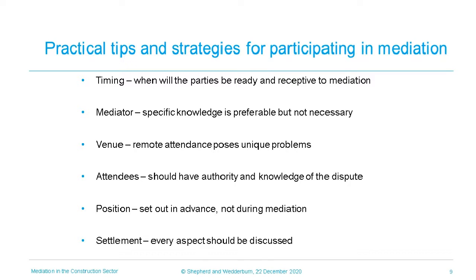Opportunity here is calculated differently than for other, less flexible methods of dispute resolution. It is best calculated by pragmatically assessing when each party will be ready and receptive to mediation. External factors may also influence timing. For example, a mediation clause in a contract may stipulate that parties must attempt to reach a settlement through mediation before any other further proceedings can take place.